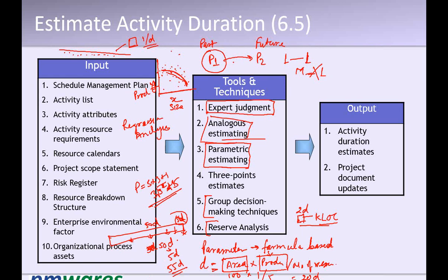So suppose you have put one day here, or say 2 days here, and 1 day at the end. Now if you face some challenge of 1 day on this milestone, you are still good. If you face some challenges during this time, up to 2 days, you are still good. Right? So you keep delivering your milestones on time.